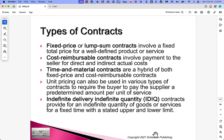Indefinite delivery, indefinite quantity (IDIQ) contracts provide for an indefinite quantity of goods or services for a fixed time period, with stated upper and lower limits. The quantity — and therefore the amount paid — can change, provided it falls within the specified time period and quantity range.